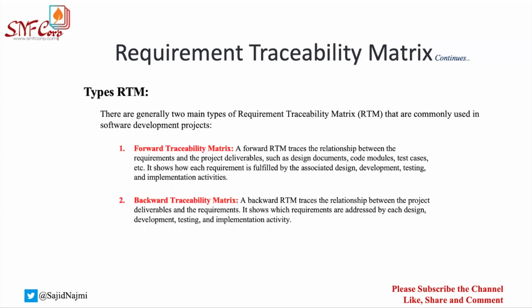That is called the forward traceability. I found one number in my Excel, and from Excel, I'm picking that link or number, going to the SRS, to the particular section and looking at the information. That I call it a forward traceability. Backward is the other way around.